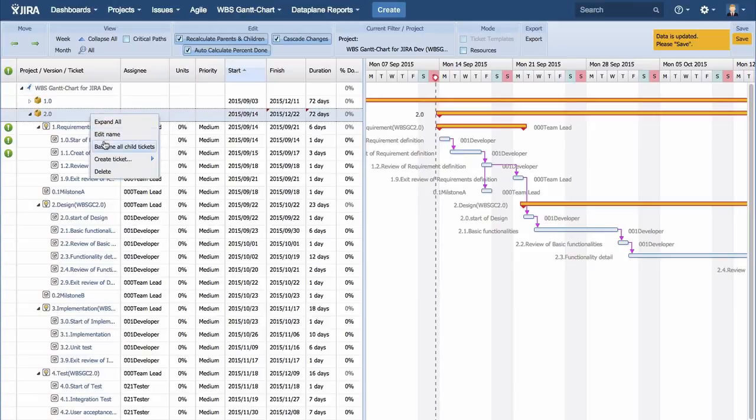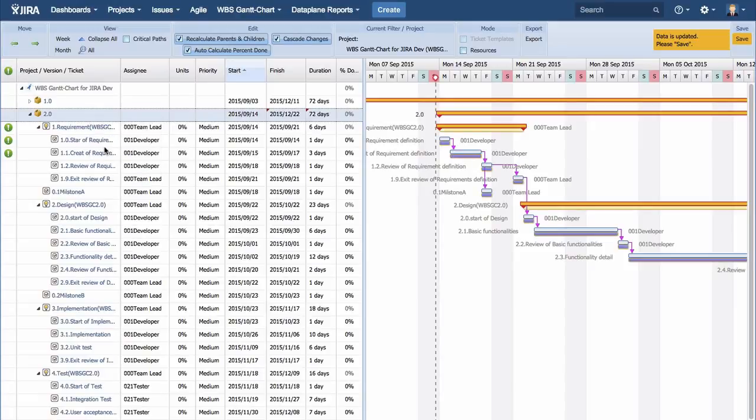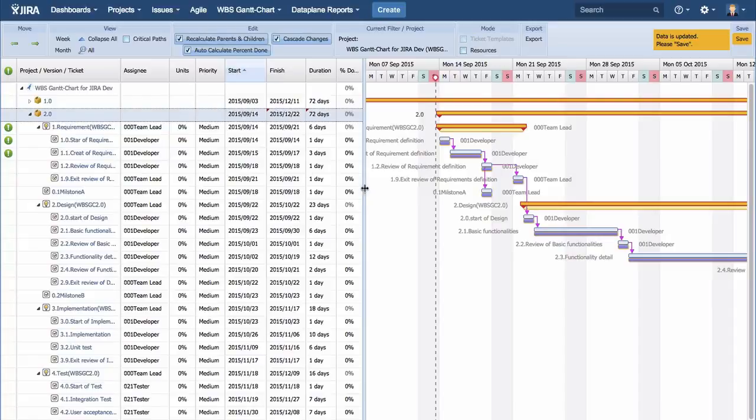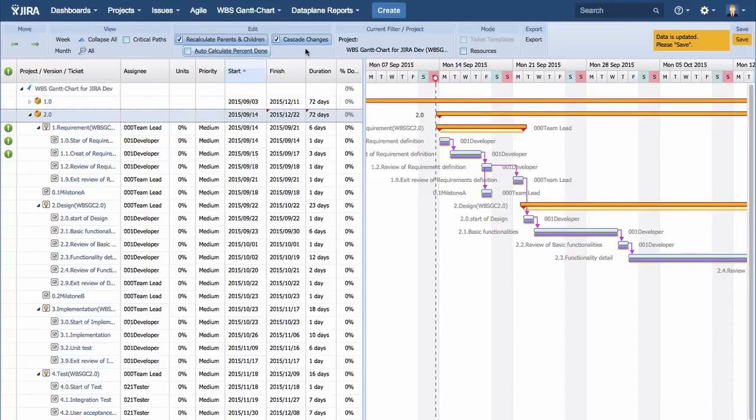A baseline bar is displayed on the Gantt chart, and when the schedule is changed, you can compare the changed schedule and the baseline one.